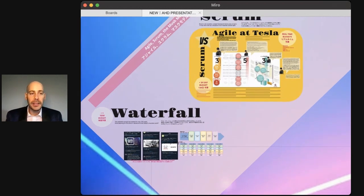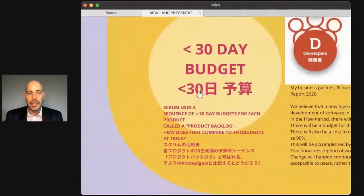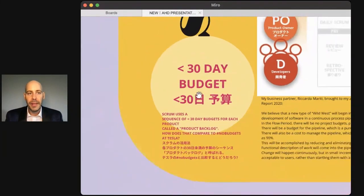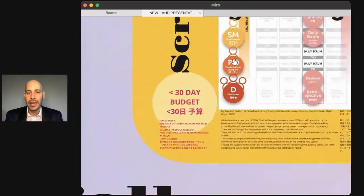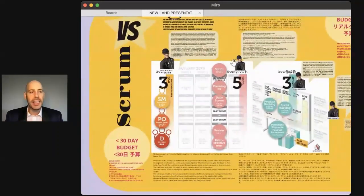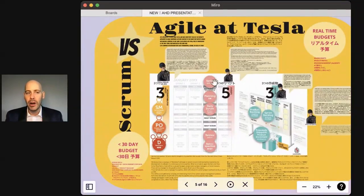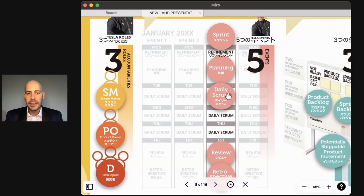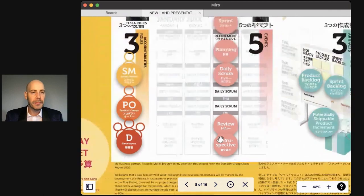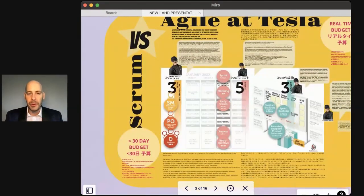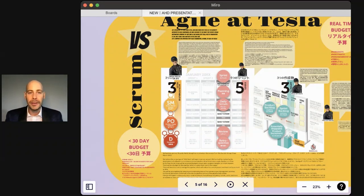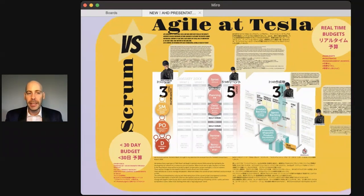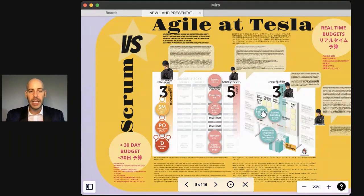The first step for many existing Waterfall companies is to do Scaled Agile framework and move to quarterly budgets, big room planning. Then those companies typically move to Scrum, which has 30 day budgets or less. We call those sprints. To do that, we introduce a product owner role to allocate the budget in 30 day or less cycles. We call that list the product backlog. Scrum is actually the least agile of the agile methods. It's just a mini Waterfall. That said, this is revolutionary for most companies. If they can get to a 30 day or less budget and release cycle, that is phenomenal. But 30 day or less budget cycles is way too slow for a company like Tesla. Tesla does not use product owners, Scrum masters, product backlogs, sprint backlogs, retrospectives, any of these aspects anymore.